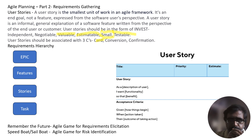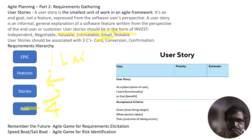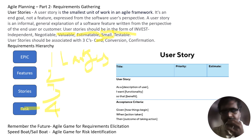Requirement hierarchy: the first layer is Epics, second is Features, third is Stories, and finally Tasks. Agile requirements follow a hierarchy based on the size of work required to build them. Common hierarchies: Epics at the top, then Features, then Stories, and Tasks. Large user stories are called Epics or Features, which are broken down into user stories. When a user story is picked up for development, it may be further broken down into tasks. All kinds of requirements — Epics, Features, and User Stories — follow the same user story format.